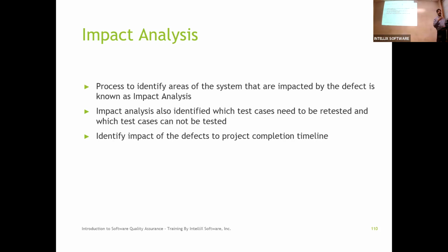And sometimes you may not have an opportunity to have flexible time, right? For example, your federal tax return needs to be filed by April 15th. Right? If you find a defect, and say it's going to take me like 2 months to fix it, and you found that on April 1st, that timeline is going to go past April 15th, right? That may not be feasible, right? Because now all of a sudden you're making a whole bunch of your user base refile or put in an extension request, right? That's a huge impact.